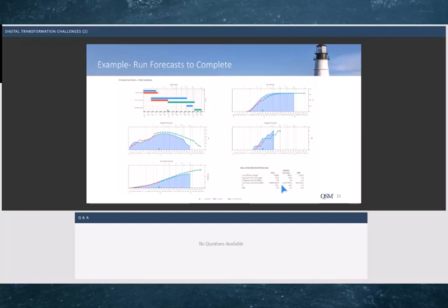So what this tool does is take the actual work the vendor has delivered, the actual effort spent, and the actual duration that has elapsed, and it recalculates that productivity index that I mentioned earlier. Remember that measure of efficiency, that measure of productivity that takes into account the overall process. Now we can see the vendor promised us a 16.1. They're only achieving a 14.5, and that's why they're late. Your vendor might not even know what a PI is, but you're going to know, right? They're going to tell you, okay, we're going to finish with this amount of time, with this much money, with this much effort. And you're going to know what that productivity index is because the Slim tool will calculate it for you, and you're going to be able to see if it's competitive. And then when you track their work, you can see if they're working to that level of efficiency.